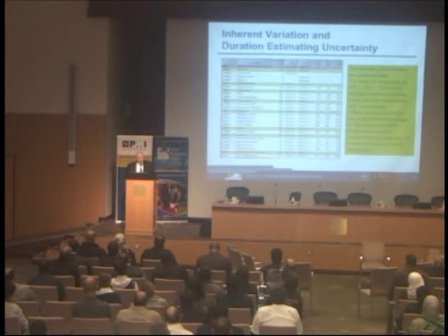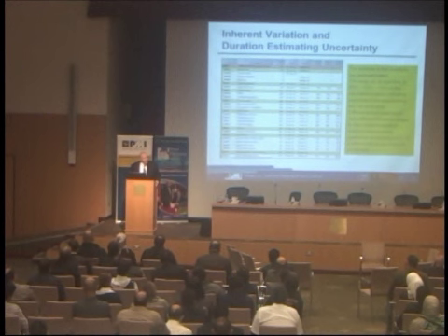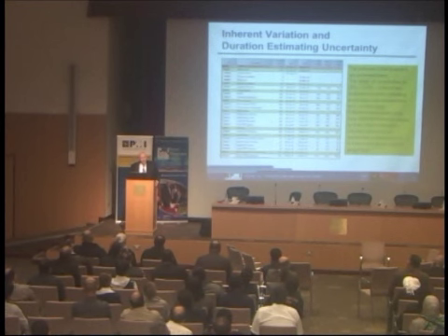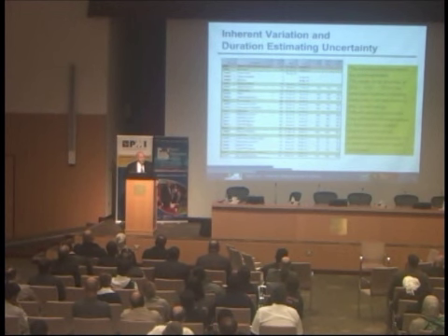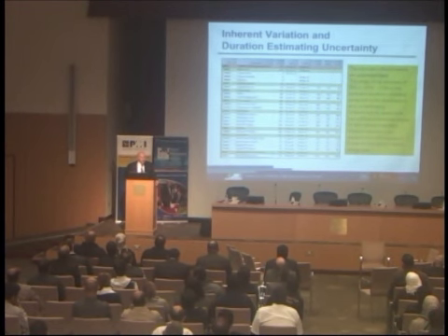For two reasons. One is that the range, even for inherent variability, is skewed to the right. And number two, there are a lot of parallel paths and merge points throughout your schedule, in a real schedule. And at every one of those things, typically, you will have more risk generated at the merge point than you had for either of the merging paths. And so a project manager who says, well, why isn't my schedule at least 30% likely to happen, maybe 50%? I've got good schedulers, I use good schedule software, I don't put any pressure on them or anything like that. Well, it's because it's easier to overrun than underrun, and the structural aspects of a schedule mean that overrunning at merge points is a problem.